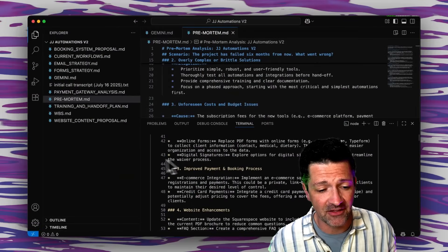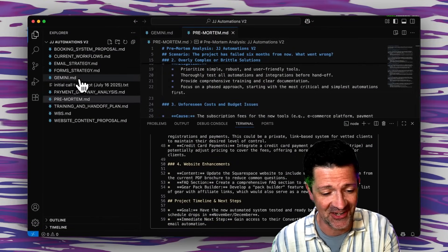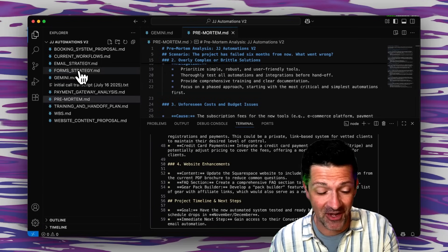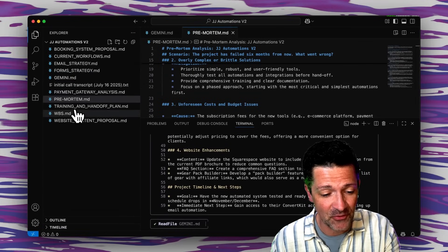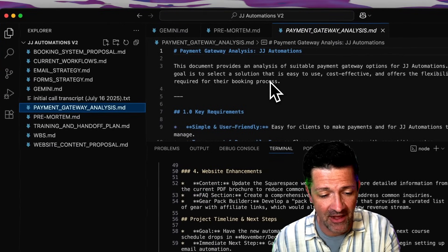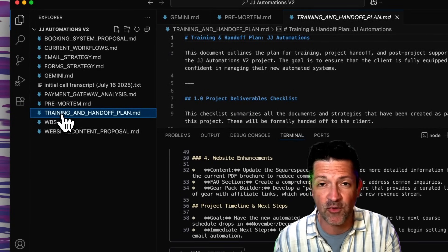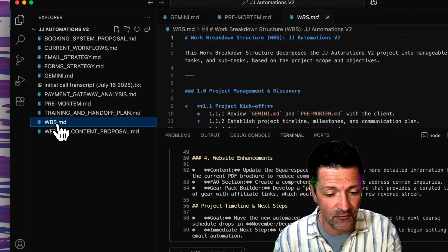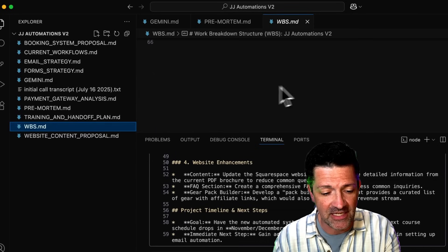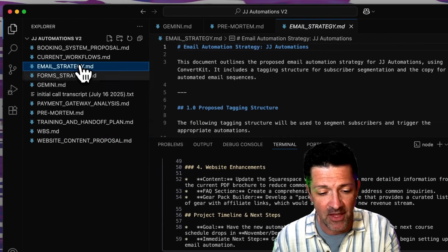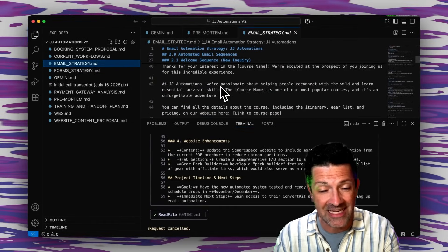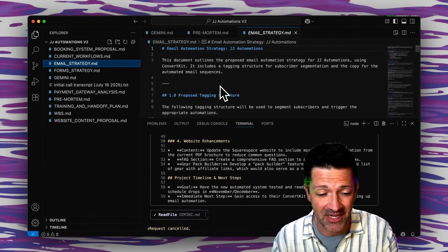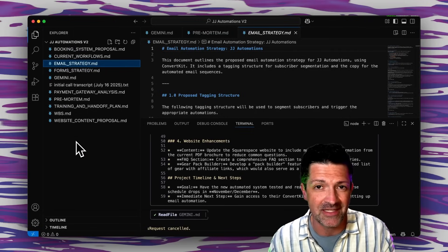And with that alone it has now created the whole strategy here. This is above and beyond what I was expecting frankly. It has gone through all of this, it's given us a payment gateway analysis, it's given us a training and handoff plan for when we finally send this. Of course it's given us this work breakdown structure but it's given us even more, the website content, email strategy. These are all of the things that we need to create this project so it's now filling out all of the different components that we need. What's beautiful about this is we can then as our skills develop start building code for each of these different pieces.